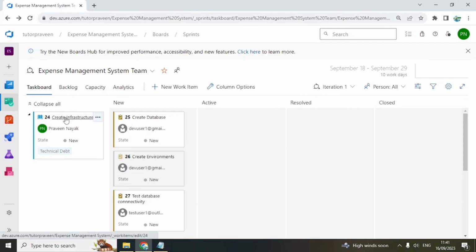You can also split this story if you think it is too big a story. It should not actually be a story, because a story should be something which can be delivered in a sprint. If you think it's too big a story, it will carry on for 3 or 5 sprints. So in that case, you actually split it, and you have a small team, right?